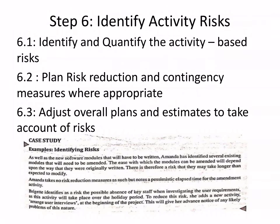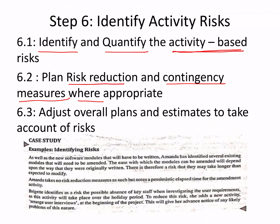Step six: identify the activity risk. Step 6.1: identify and quantify activity-based risk. Step 6.2: plan risk reduction and contingency measures wherever appropriate — once you identify the risk, discuss how you will reduce it and what contingency measures will be taken and where. Step 6.3: adjust all plans and estimates to account for the risk. A case study example is given here which you can go through.